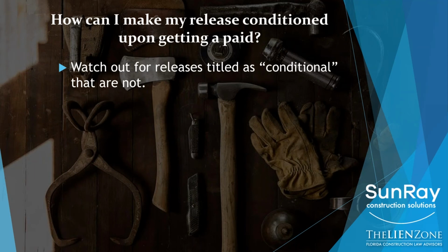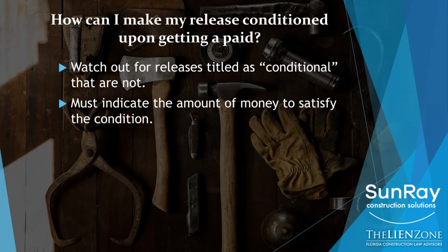Watch out for releases that are titled as conditional, meaning that the document says conditional release, but when you read it, it's actually not conditional. It doesn't have that express conditional language that I had from the prior slide. You need to indicate the amount of money to satisfy the condition. So if you're expecting a $25,000 check, it has to say that it's expressly conditioned on the $25,000 that you will receive.